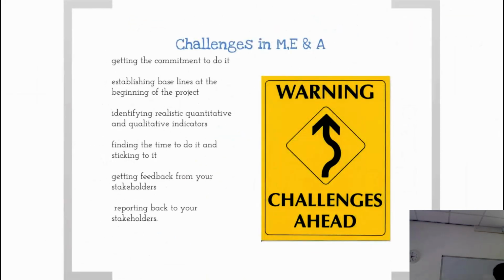Challenges for monitoring, evaluation and assessment. First off, getting the commitment to do it is a huge challenge. So again, as I was saying, a lot of people don't like to evaluate their projects at the end of it. So you have to build it into your project plan at the very start, and then people can't get out of it. So when you come back and say, we need to evaluate this project, and they say, well, we don't want to, you say, well, actually it's part of that project, we won't be successful if we don't do that.